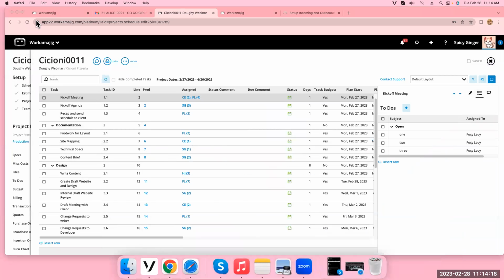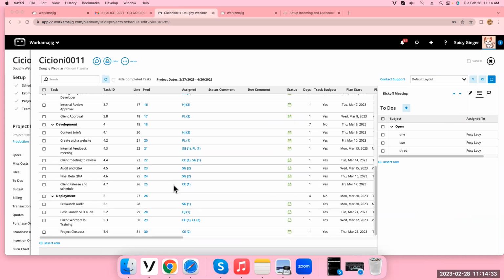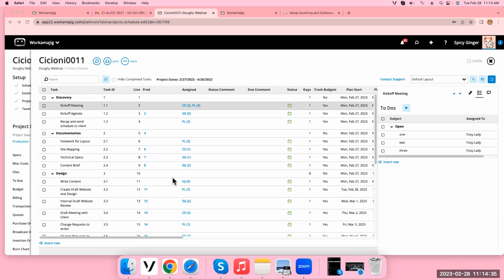All right, so really the detail of the to-dos, this wasn't supposed to be part of my spiel, but it's really to just be able to give more involvement on the item of the task if you need to. Like I said, some clients are moving towards a smaller schedule instead of a big schedule, because it's easier for them to keep adding time to graphic design and then put more to-dos. And then they have this nice little board that they can look at and complete their items of the day. So it's just a different way to manage and you can make it more of a Kanban style.